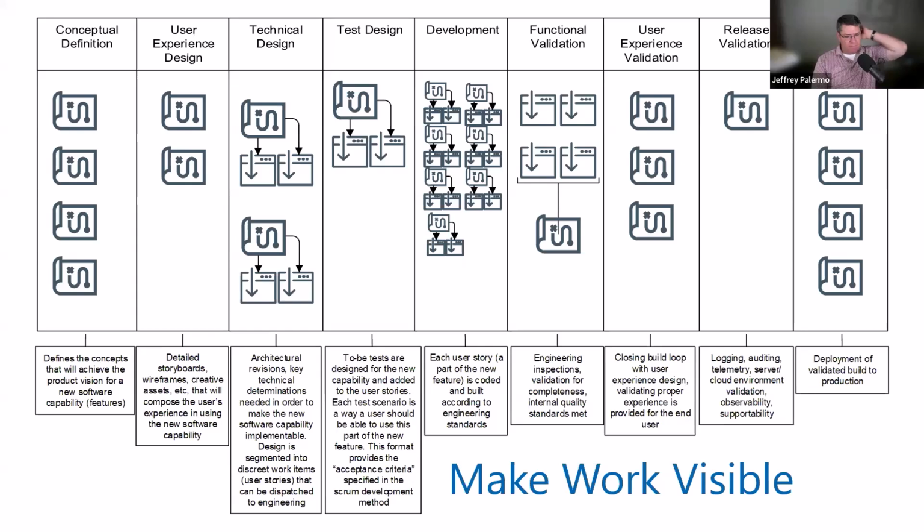What makes this Kanban style and an implementation of the Agile Manifesto is that you move one software change through independently of others, one at a time, single piece flow, as opposed to batching dozens together and moving them through. If it's a simple text change, it may fly through this board really fast. If it's a more significant software capability, it may take longer.